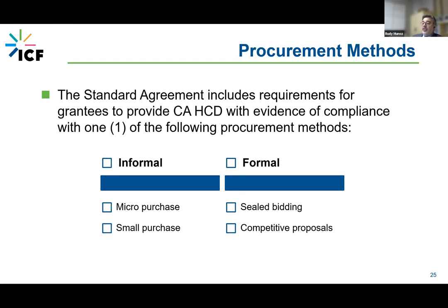That evaluation should include a review to determine if the bidder is responsive and responsible, and is the bid reasonable? So remember that costs are considered reasonable if they do not exceed what a prudent person might incur under similar circumstances.